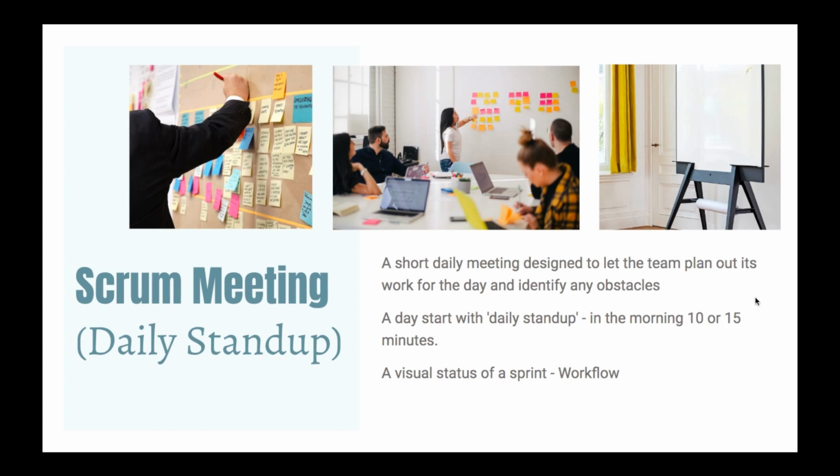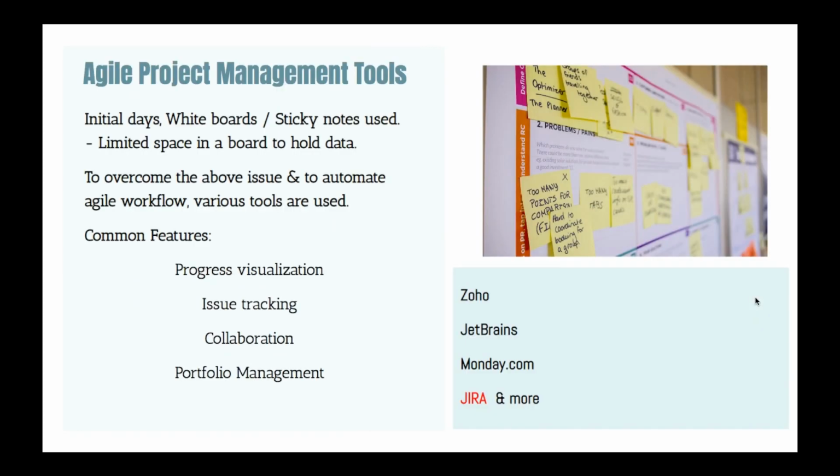So daily stand-up is a very famous terminology in Scrum. Your day starts with a daily stand-up. It's a brief meeting, 10 to 15 minutes every day. If you look at this picture, this is typically how the initial days of Agile were. Either sticky notes or whiteboards were used to visualize the whole status of the sprint.